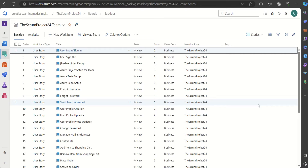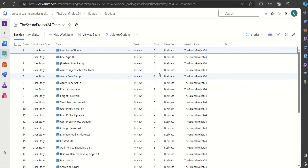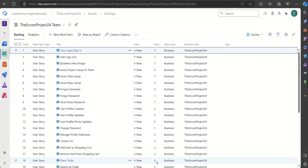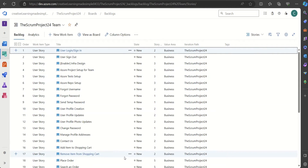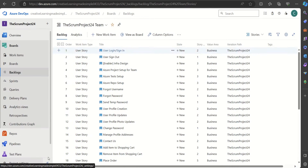If I click on 'Stories', these are the set of stories. All the work in the user story has been estimated using story points. We are using the Fibonacci series where the scale starts from 1, 2, 3, 5, and then goes to 8 (3+5=8). These are the set of user stories.